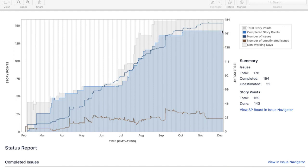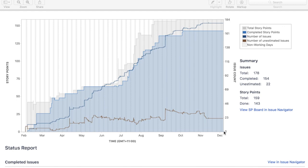As and when you are completing the issues within that epic, this unestimated number of issues should come down. At the end of your epic completion, or finally when you are about to complete your epic, there shouldn't be any unestimated issues in your epic.